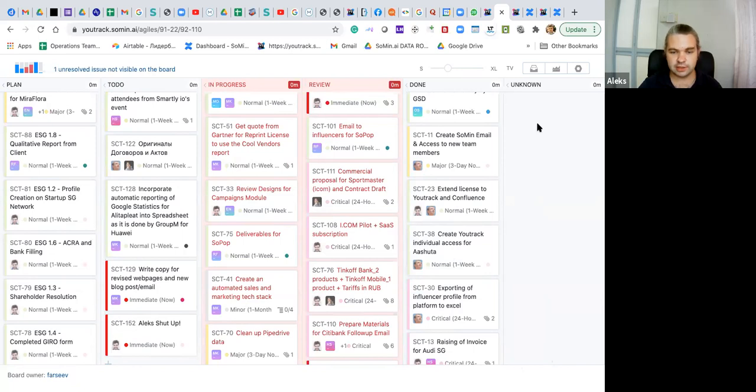But this helps in 2 ways. First, it will help the person who does the task understand how much time you think it takes. So it will help you to bridge the gap of understanding, so that it wouldn't be a situation when somebody feels 5 minutes, but another person needs 5 hours. It seems that another person doesn't know something to make it fast, or the first person feels it's too easy, so maybe it's a wrong plan. So it will bridge the gap of understanding.